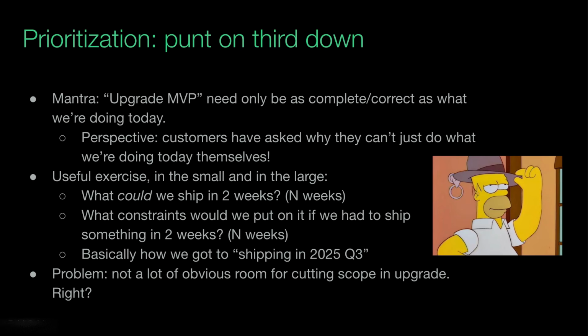And it can change the way you're thinking about what is truly required, because you start asking, what can we throw out in order to hit that date? And if the answer is too much, then fine, the answer is too much. And you go back and say, we can't do anything less than that. But it's helpful to think about.